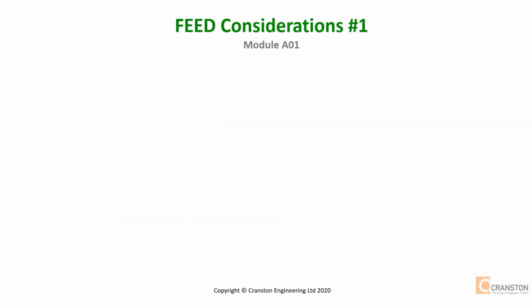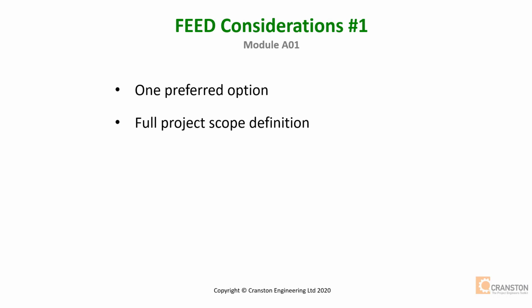After conceptual design, we move on to FEED. On completion of the conceptual study, there will generally be one preferred option to take through into FEED. The purpose of FEED is to fully scope, plan and cost the project to allow it to be submitted for full project execute phase approval. At this point the team size will increase, as will the rate of project expenditure.